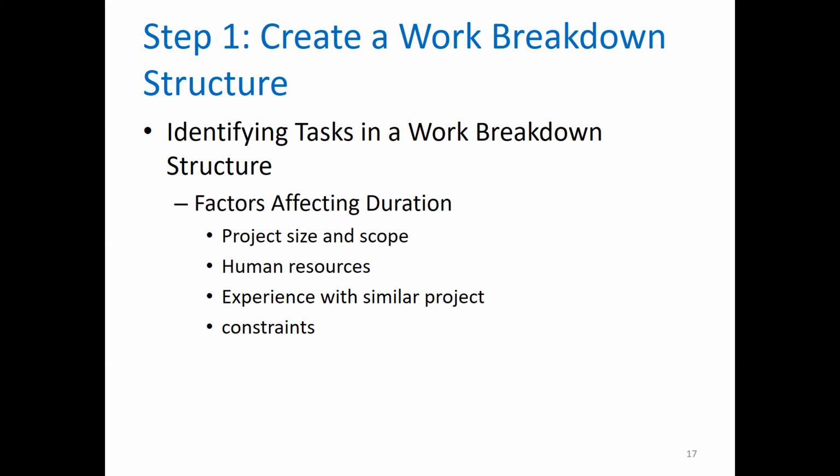Other human resource factors would be the team morale, how well the team is working with one another. If there's too much hire and fire within the project team, when I say hire and fire, a lot of people are fired and a lot of new people are hired, it'll take longer. Why? If a new person comes in, he or she would need to start learning the project from the very beginning and then reach the point where this particular staff was fired. So it also takes time.